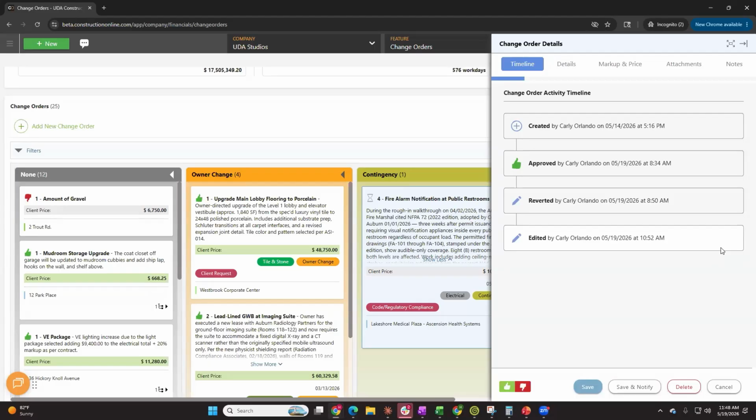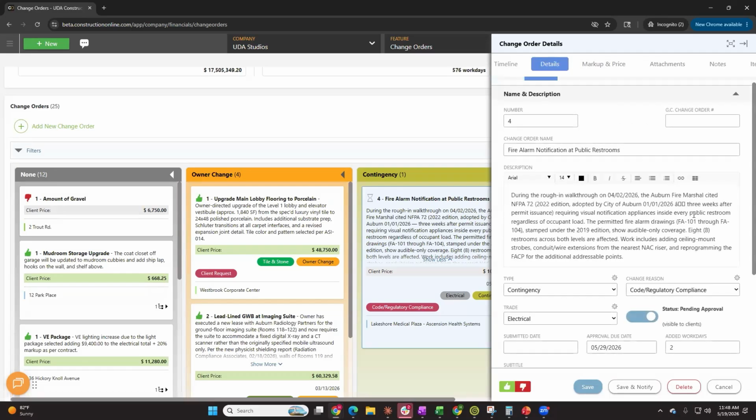That change order summary is not only going to break down what has been rejected, what has been pending, and what has been confirmed or approved. It is also going to tell you what our overall added workdays are. What are we expecting the price difference to be from our client just in terms of change orders? So those change order summaries are going to provide you really valuable information long term. Reviewing those at a regular cadence and making sure you're familiar with where each of your jobs is at is really going to save you in terms of, oh, did I submit that? Or, oh, have I heard back about this yet?